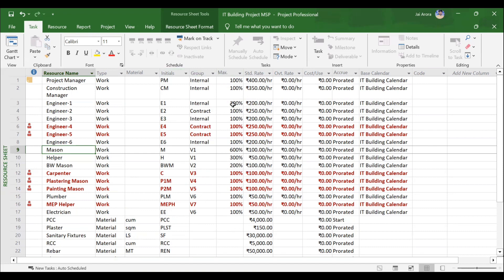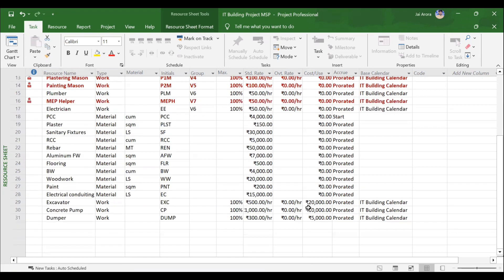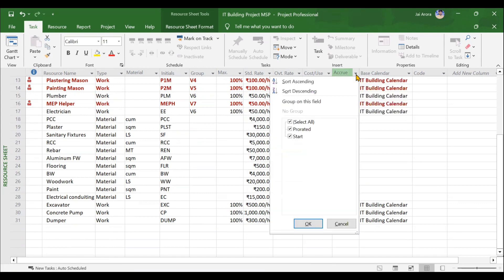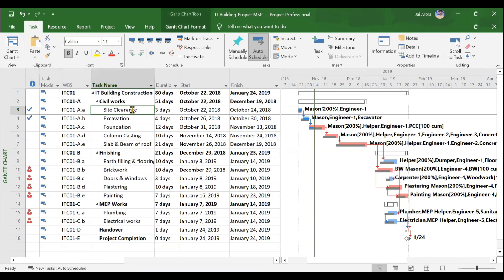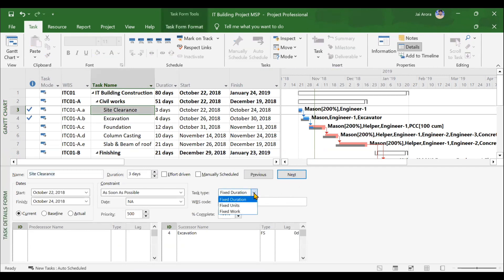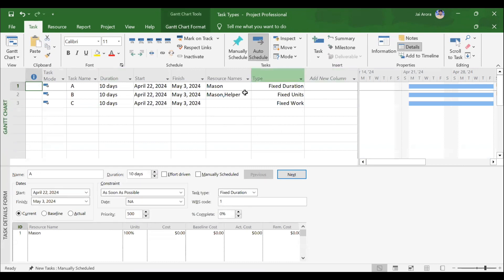We will understand how to assign units to material resources, how to create initials, how to group them, and how to assign maximum units. The units percentage represents the number of resources — 100% means one engineer is available at maximum. Then we will cover standard rates, overtime rates, cost per use, and the accrual of resources like prorated, start, and end, plus base calendars for resources. After creating resources, we will understand one very important concept called task type in MSP: fixed duration, fixed units, and fixed work. I will create a separate project with three activities of different task types to demonstrate how task type is highly related to resource assignment.